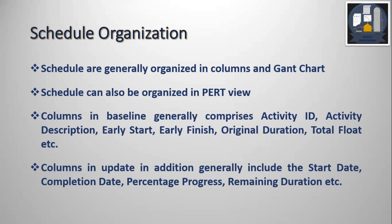The Gantt view has columns and a Gantt chart. The columns in the baseline generally comprise the Activity ID — the unique ID — the activity description, the detail of the activity. Then we have the early start, early finish, original duration, total float, etc. This is just an example of a few of the columns we can have.